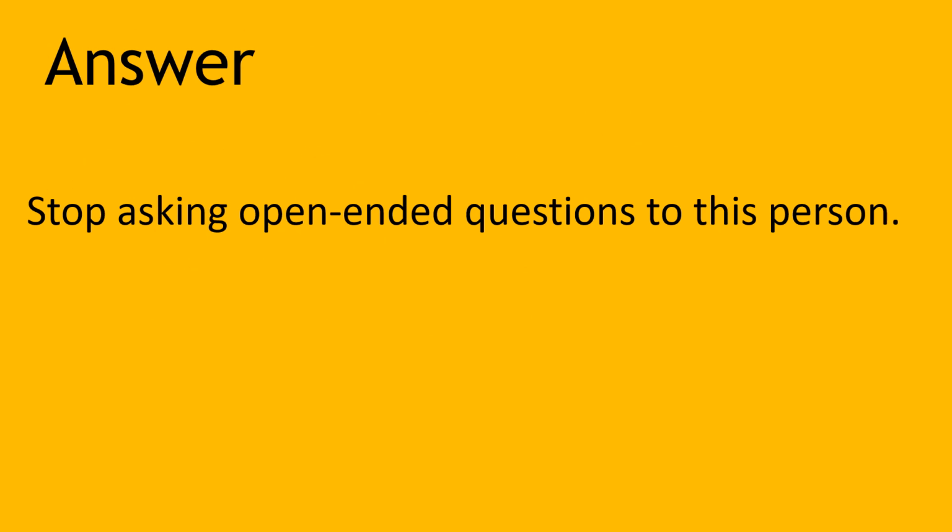The very first thing you should do is stop asking open-ended questions to this person. Ask him which user story he worked on yesterday rather than task level details about what he did with each story. The detailed information should be available to other team members through transparent means such as source control or the team Kanban if anyone needs that level of detail. Then ask whether he has any dependencies on other stories today and if there is any help he needs to complete work he's attempting to complete today. Keep the scope of the questions narrow and concrete.